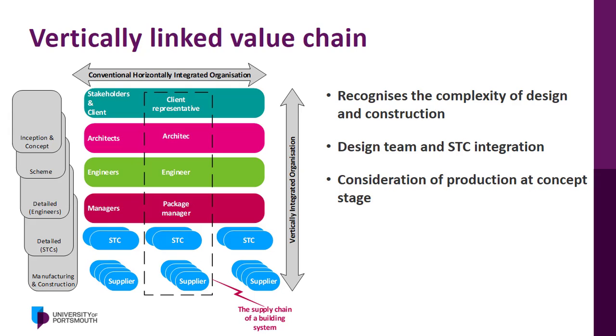The integration of the design team with the STCs ensures that the value requirements created by the design team are conveyed to the STCs continuously, and the production requirements are considered as early as the concept stage of the project. In this way, there will be no loss of values in rework or substandard quality.